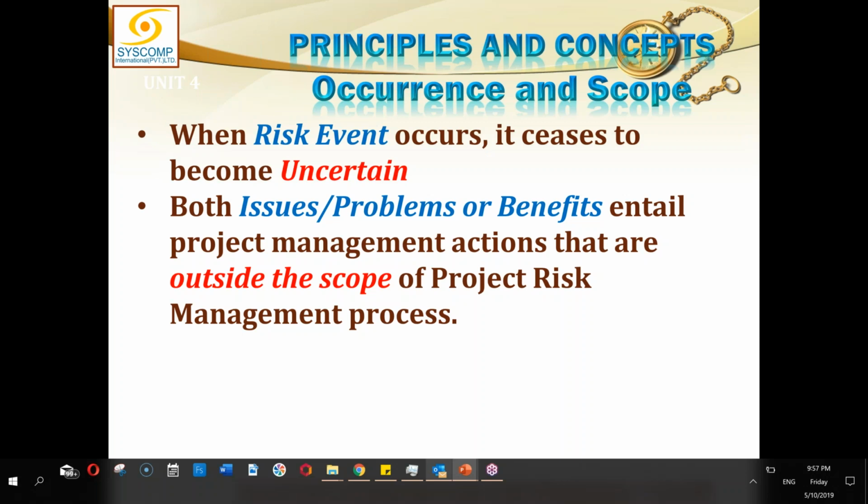You are not focusing on the risk. You are always talking about how we'll get delayed, get delayed, due to this reason. In the scenario Khyam defined, the risk is that we have lower power or control over the sole source supplier. The risk is that they are not worried about the priority. They don't give priority to Pakistan staff when it comes to sending the security equipment, because we have a sole source with Thuraya. Of course, that's the risk. Their attitude is not concerned that they need to send the equipment to Pakistan on time.